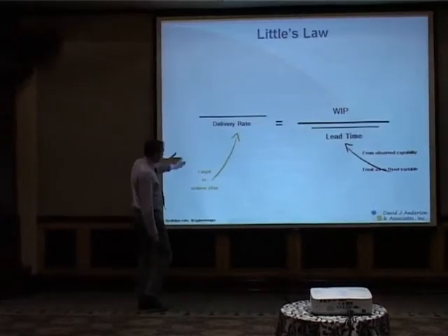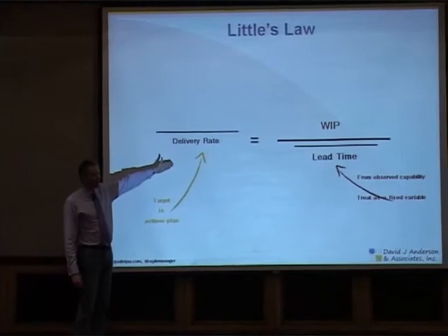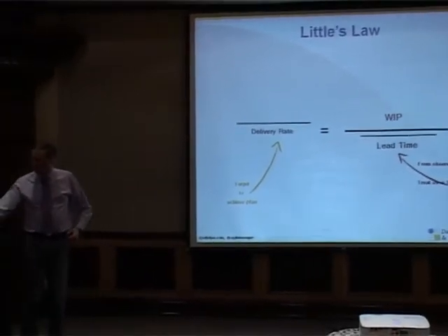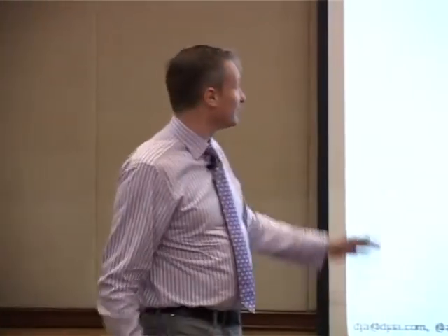Then, the delivery rate comes from the plan that we have. That slope in the middle, how fast do we need to go? And those things will help us determine the quantity of WIP. And from the amount of work in progress, that will determine the staffing level we need. So, on the chart I showed you, that middle section, when we need to go fast, is 55 per week. And if we have a team that can complete a user story on average in 2 days, with a tail of between 5 and 10 days on a distribution, then that's 0.4 weeks is the mean lead time. If we do that math, we end up with a WIP of 22.